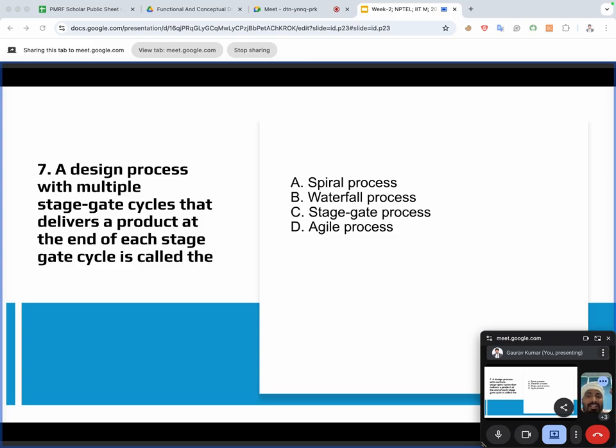So you are getting higher, closer to the final product. But you revisit the same point from a more advanced stage, like design, feedback, and then testing. This is called the spiral process. And what is the advantage? Let me also tell you the stages of each spiral loop: determine the objective, identify and resolve the risk, develop and test, and plan the next iteration.